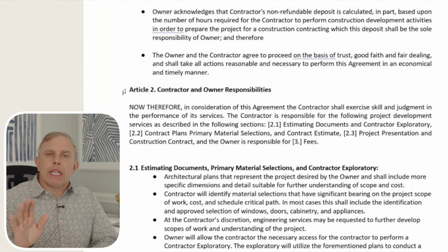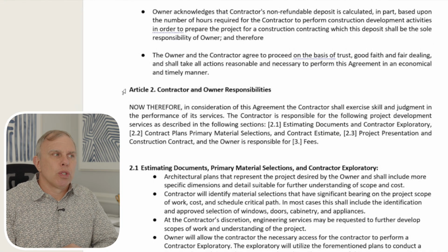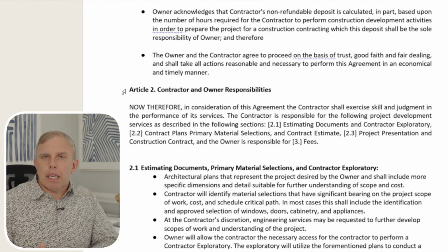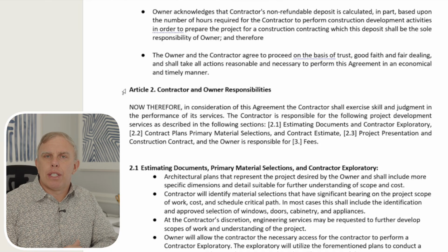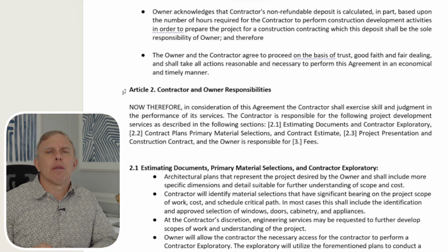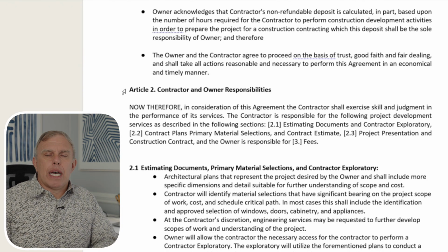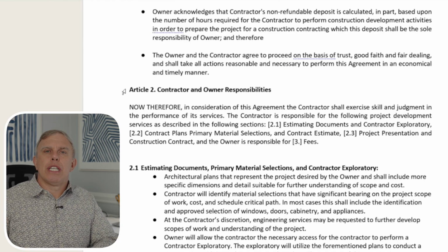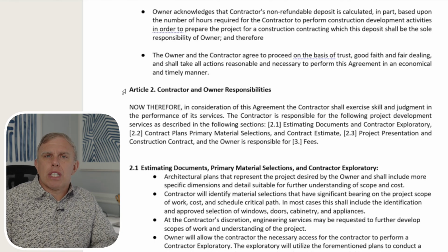What we're going to be doing in development is different than concepting. We're going to be proving out our concept. So we're going to provide you with estimating documents. We're going to do a contractor exploratory, which means we're going to bring out our specialist trades and/or engineers and anybody we need to bring out to make sure that we've got the details and the scope of the project right to help us have a smooth transition into a construction contract, and also to help our team make sure that things are right and our trade partners know the scope of work so we have a smooth process and we understand the timing and monies it takes to get the actual construction done.